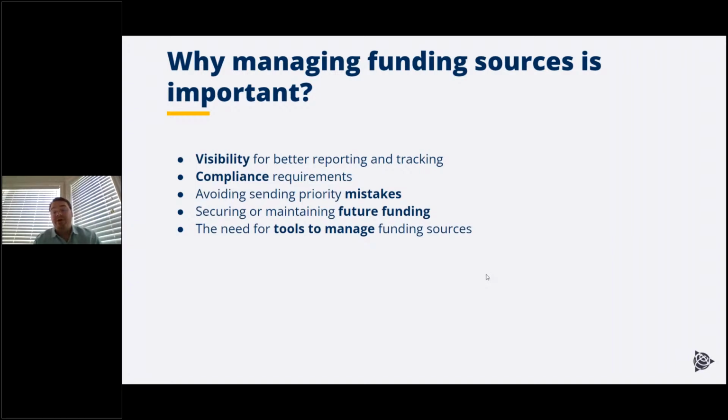Again, really important when we talk about programs that fund on, if we look at something like DOTs that fund on a 2-year cycle, right, with a 5 or 10-year outlook, but we're only actually getting 2 years worth of funding at a time. So that constant interval of reporting of when we're going to need more funding and making sure that that funding need aligns with the current status of the project, right? Have we had change orders in this 2 years? Has the scope grown in this 2 years? Has it shrunk? And we need to look at other ways we can utilize that money over the 2 years that we've been working, and what adjustments are we making as we continue to ask for that funding as we continue to roll out that project.